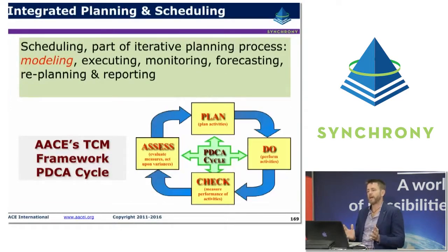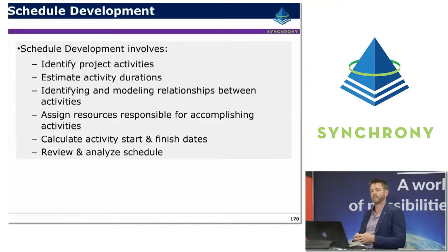So in terms of integrated planning and scheduling, scheduling is part of that iterative planning process of modelling. So essentially it's the modelling, executing, monitoring, forecasting, replanning and reporting. The schedule development process itself is basically an extension of the planning process that we had earlier. So having broken down the work scope into the work packages, it's then about identifying and further breaking down into activities, estimating those activity durations, identifying and modelling the relationships between those activities, assigning resources, calculating start and finish dates, and reviewing and analysing.